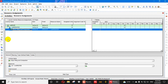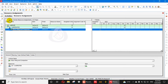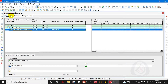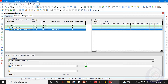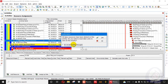It's very difficult to assign resources one by one to all activities. For a 500 or 1000 activity project, assigning labor, non-labor, material, and cost resources individually is not practical. There are four types: labor, non-labor, material, and a fourth option for cost loading. I will remove that manually assigned resource and show the easier method using an Excel sheet.